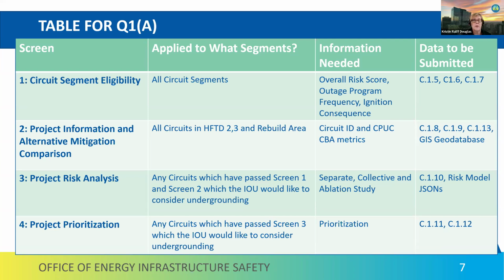As you know, as part of the plan, the utility submitting the plan has to submit a portfolio mitigation objective, and all of the projects have to add up to that level of risk mitigation and the reliability increase. So we're not telling them which projects to do, and we're not even telling them what the risk scores of those individual projects are. We're just saying you have to set a mitigation objective and then you have to meet it. Understood, but you're not validating whether they're meeting it or not, are you, within the 9-month period?